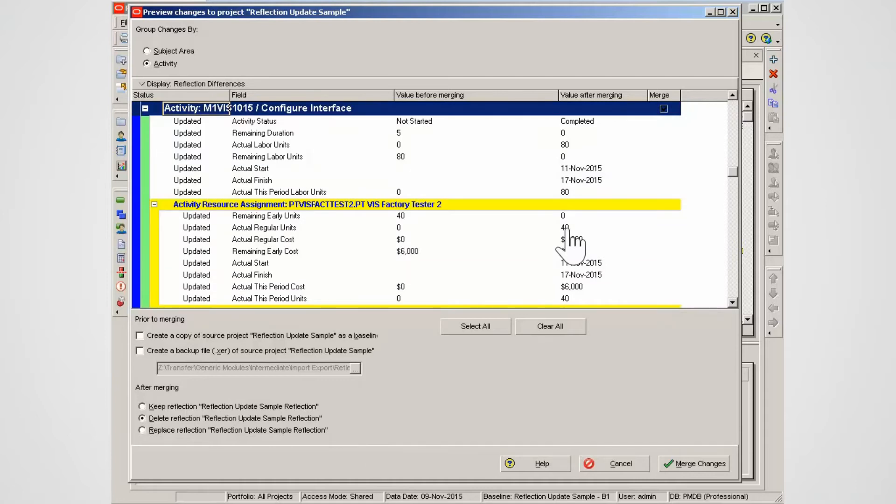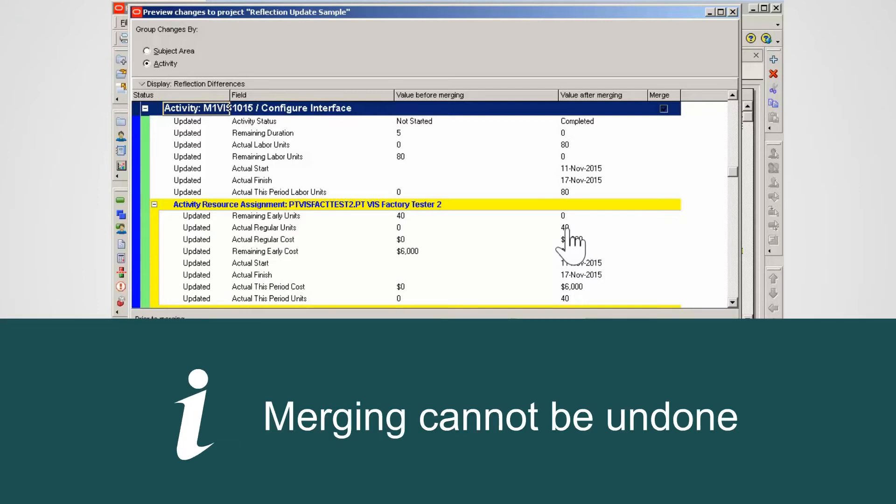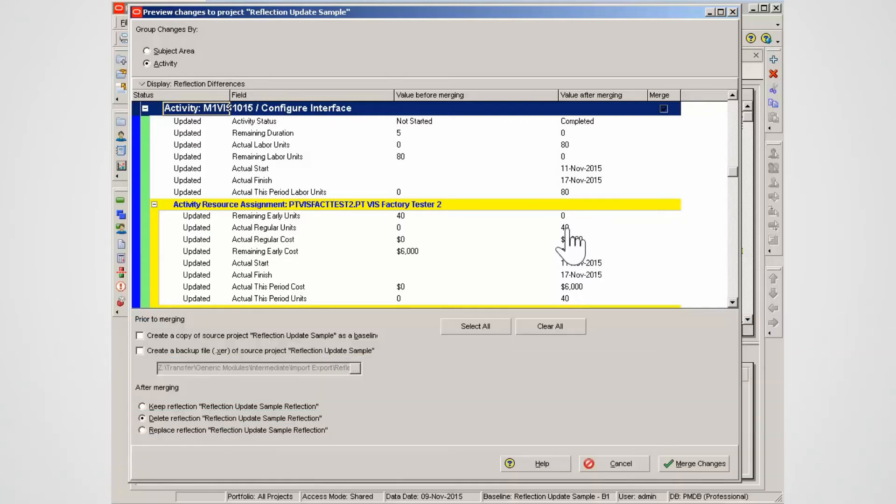You can create backup XCR files, a baseline or both. Merging cannot be undone so making a backup file is a good idea.